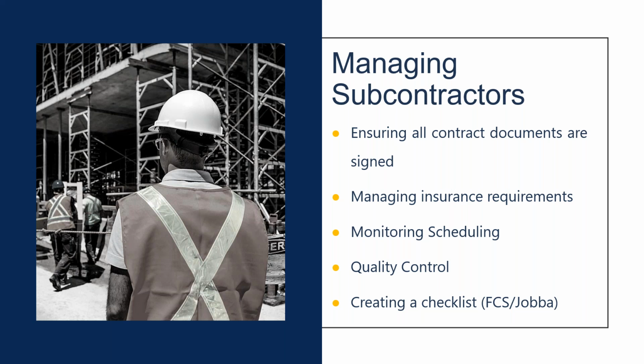But from a logistics standpoint, it's good to have a master subcontract agreement along with proposals or notice to proceed for each job that tie back into that MSA. Okay, and that way, they only have to sign the 15-page document once. From that point on, all they got is a 1-page notice to proceed, a proposal that has price, location of the job, scope of work, that kind of stuff. Okay, and that's a good way to keep up with your subcontract documents, make sure you have everything that you need in there.